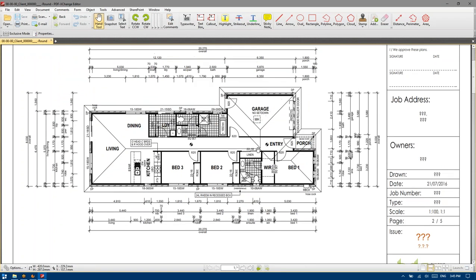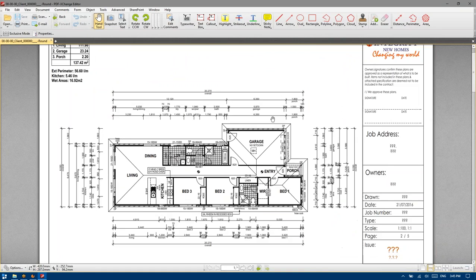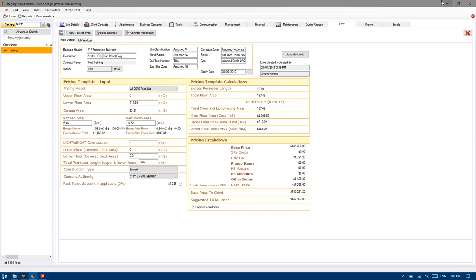Now, this job's in Adelaide so I'm going to treat it as if it is an Adelaide job. They've got terrible, terrible soil over there. So I'm going to change this to Assumed H2D.